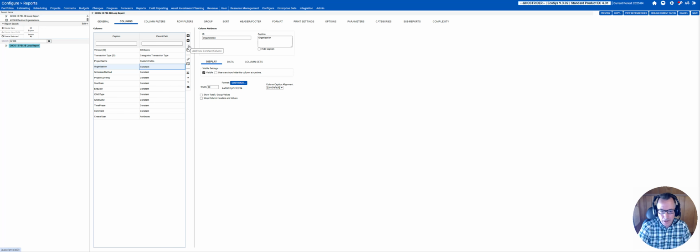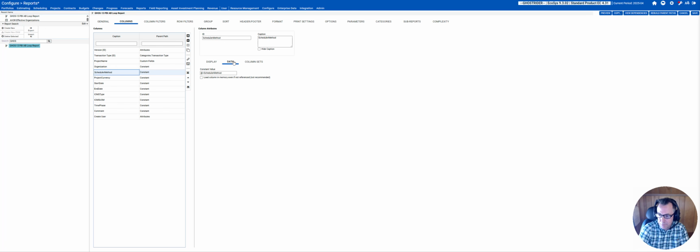Making a dedicated text custom field to show it, you don't need to do that, just make constant columns. Constant columns are not real, actual things. They only exist in this spreadsheet, so you're not having to create additional configuration objects. So we just make constant columns, and then in the data tab of the constant column, I can just type the parameter ID in the at equals syntax, and that works. That's good enough.